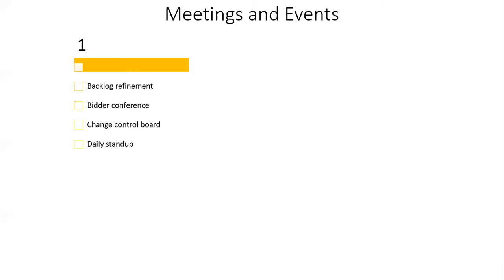The next thing is a daily stand-up. You may have heard about this in Scrum, a daily Scrum. Well, a daily stand-up, daily Scrum, whatever you want to call it, it's a collaboration sync-up meeting. The purpose is to sync up, and it reviews progress from the previous day, and intentions for the current day. And it highlights any obstacles encountered or anticipated. Key thing about the daily stand-up is you do not want to use this as a problem-solving meeting. It is used to uncover problems, but the meeting is not for solving the problems. Problems are solved outside of the meeting.